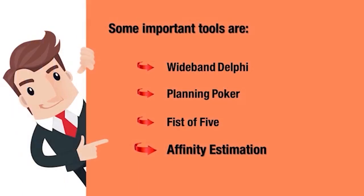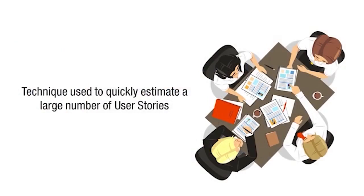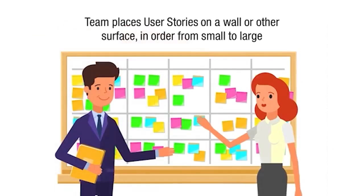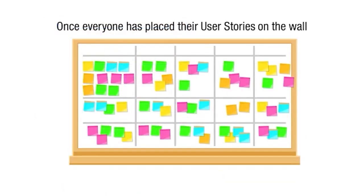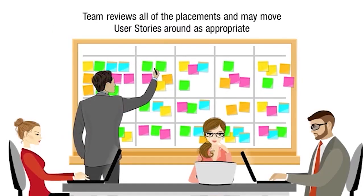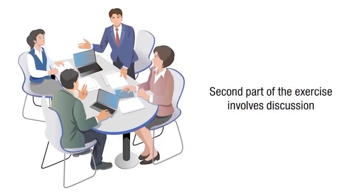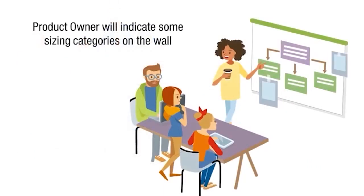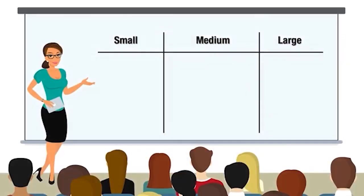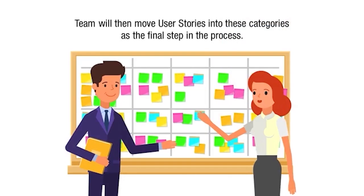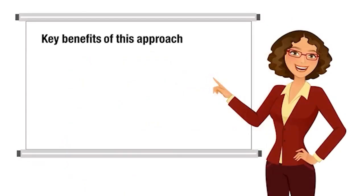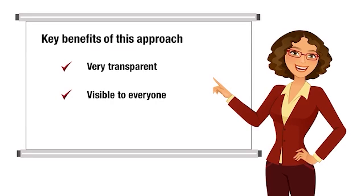The last technique is Affinity Estimation, used to quickly estimate a large number of user stories. Using sticky notes or index cards, the team places user stories on a wall in order from small to large. Each team member starts with a subset of user stories, placing them in silence, then the team reviews all placements and may move stories as appropriate. Finally, the product owner indicates sizing categories — small, medium, or large, or numbered story point values. The process is very transparent, visible to everyone, and easy to conduct.